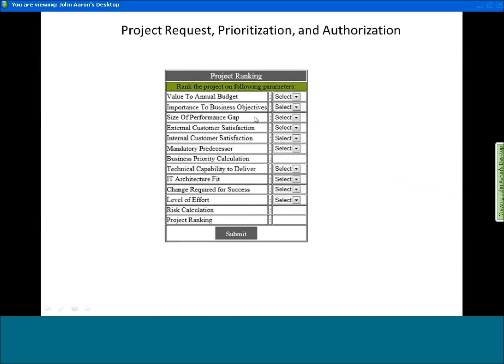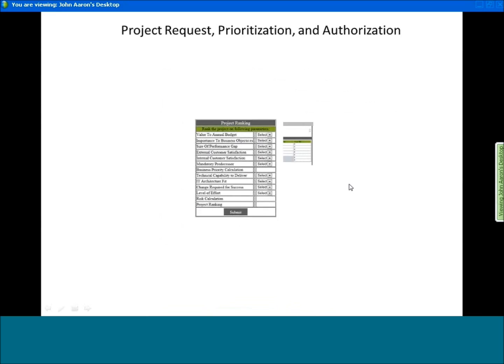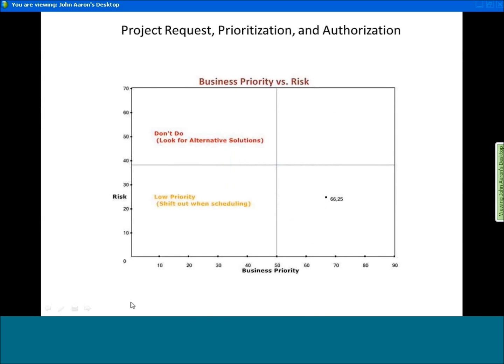We also have projects in terms of, you might say, their benefit overall internally, and then also the alignment with the organization. You might think of it as risk or just overall alignment, and these are kinds of things we can rate, so that when we go through this request management process, we can get a view of where the project request stands in terms of our priority versus our risk, in terms of does it fit, does it not, is it something we can feasibly do, and where does it stand?